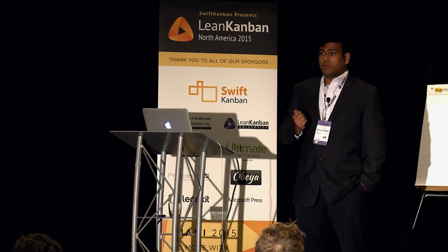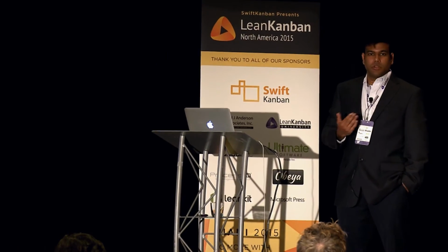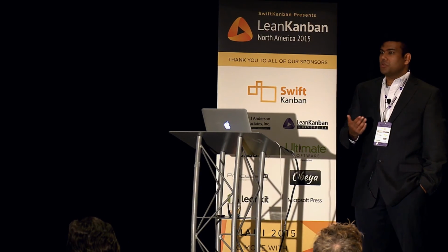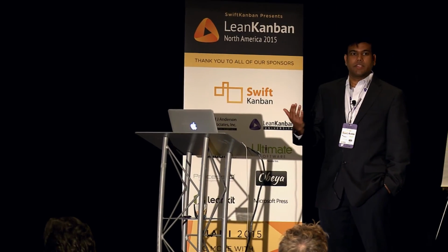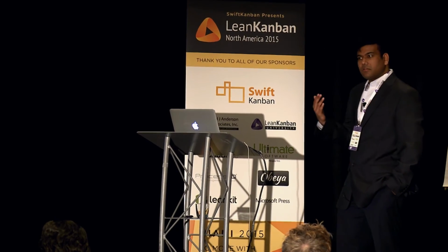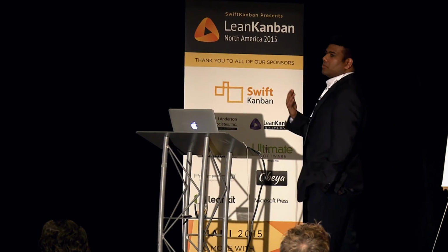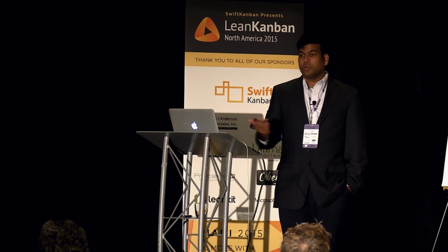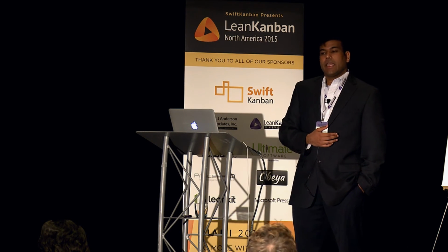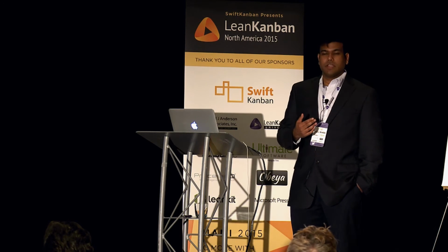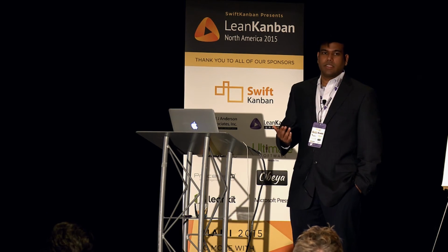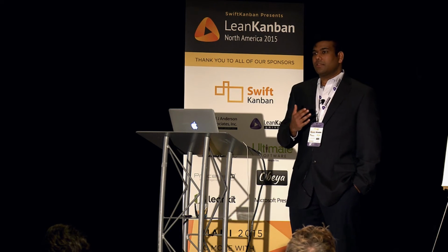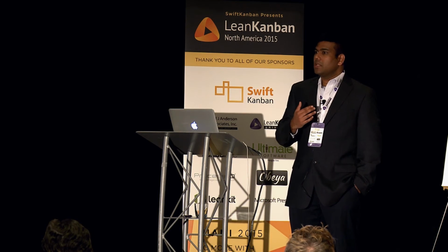Is there a value for slicing? Absolutely there is. Bill Wake's acronym, INVEST: independent, negotiable, valuable, estimatable, small, and testable. If that can truly happen, sure, there is value. And the challenge is we deal with a lot of complexity in many, many contexts, and that's not always applicable to every context.